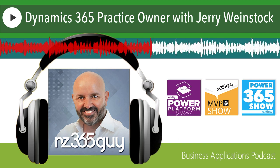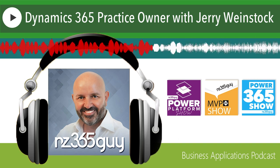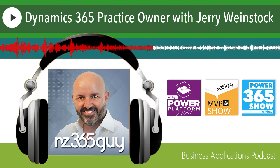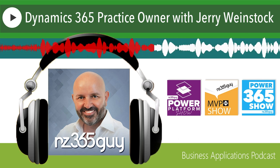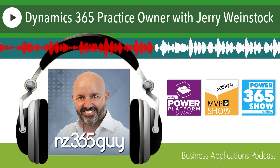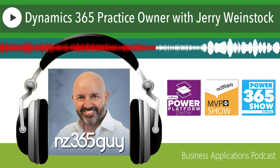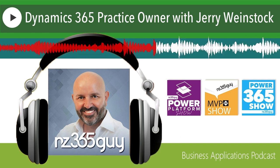That turns out to be really one of the cool parts about our business model that has worked out really well. For a small shop, or for any shop, it's expensive to have developers or functional consultants or any team members sitting on the side, twiddling their thumbs, waiting for the next billable project. Correct. So we balance our professional services work with our ISV solutions. When professional services work is strong and everybody's busy, the roadmap for the ISV solutions, or the next ISV solution, the next feature or function, or even the next product, gets pushed out a little bit.